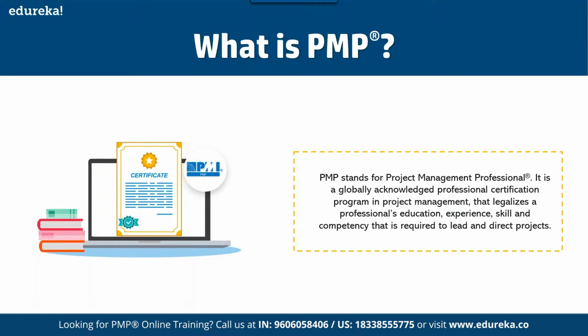You have to think from the product perspective. What is the use case of having that product? What is the advantage of launching that product? If it is for a customer, how much revenue is the company getting, how much time do you have to spend, how much money, and how many resources are you going to require? For example, your company got that project for $100,000, but you realized that the net cost of implementing it is more than $100,000. Indirectly, it's not going to be a profit but a loss, so you have to determine that in the initial phase.